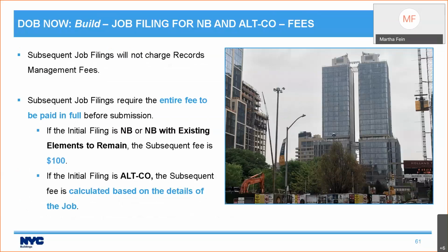Subsequent job filings, well, first of all, they don't charge records management fees. That's a side point. I just wanted to mention that. But subsequent job filings require the entire fee to be paid in full before you submit your job file.